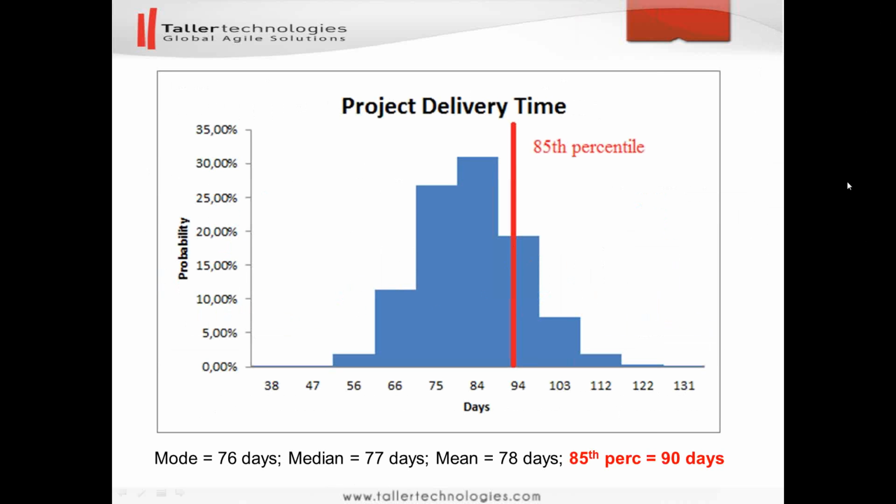So, thank you for the question. The most important thing is that we should not forget that we cannot compare one development system's historical delivery data with another one. So this is context specific data, and the stochastic information packet, in this case the distribution of average takt time, is unique per development organization or team, per business domain and technology.